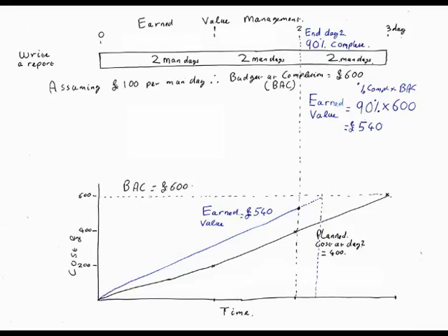You mean are we ahead of budget or schedule? Progress. We're ahead of schedule. That's right, because we've done 90% of the work, and we would have planned to have done 66.67%. So about 30% ahead of the work. But the plan was done in cost. Yes, the plan was done in cost.